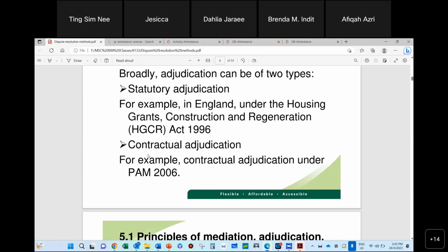So if the site is like, maybe it's the defect kind of issues, it's like design kind of issues, bending moments, shear force, or water pressure, or payment issues, all these things are very technical issues. Technical and contractual issues, we will normally get somebody who is actually in the area, like a civil engineer or a geotech engineer, or a hydraulic expert or something like that, or a project manager, for example, or a very high profile project manager, to be the adjudicators, you see. So they can resolve it a lot faster.